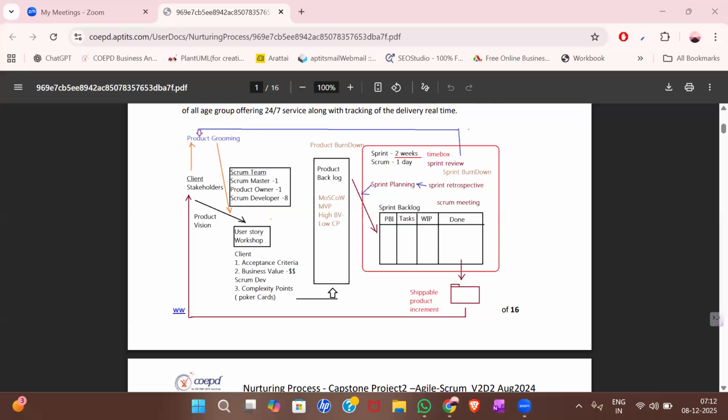So in such cases, you need to mention acceptance criteria, which are conditions to say that the user story is completed successfully. Once all these conditions are completed, the user story will automatically be completed. So acceptance criteria for a login can be like: the user ID, email and password should be entered validly, and it should allow valid information.